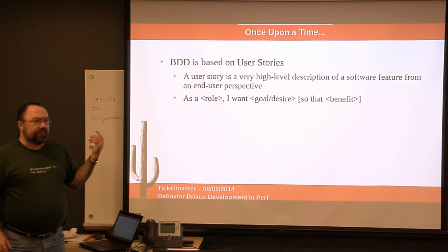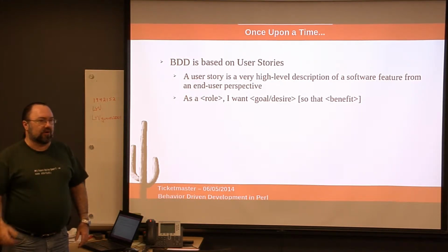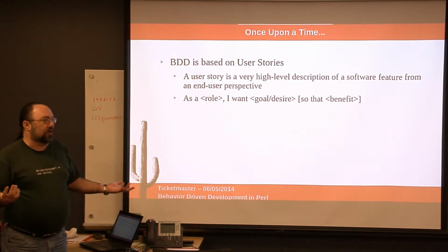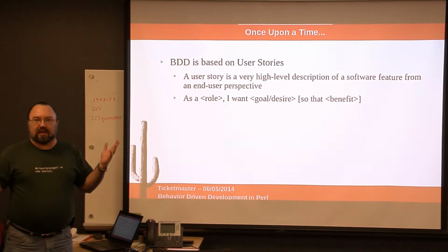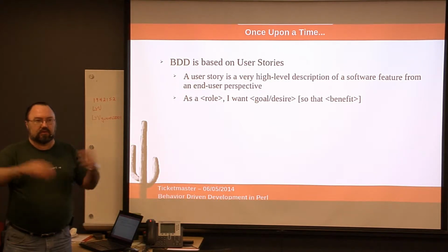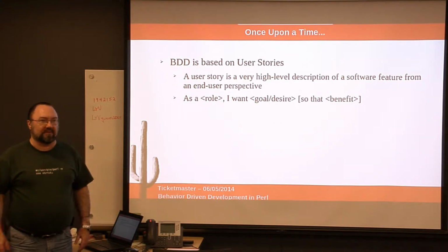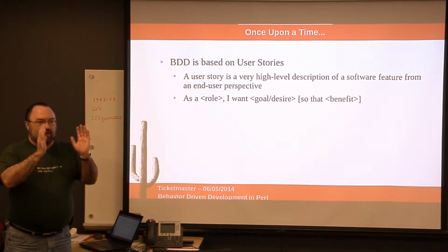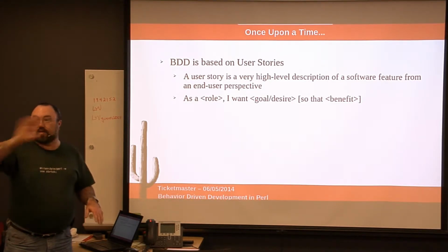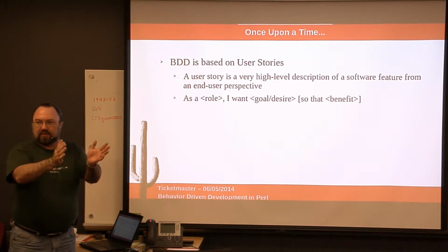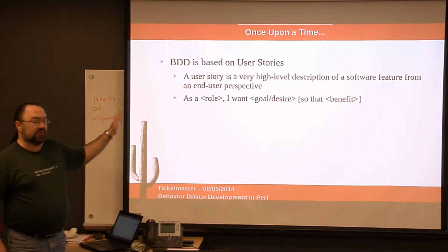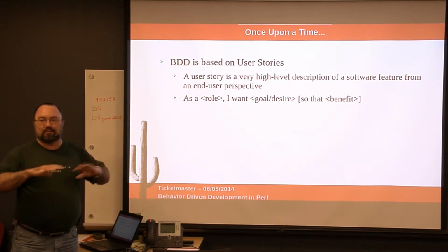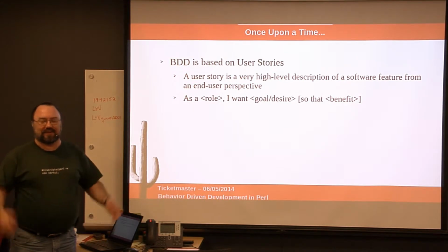So I also kind of think about it, other people may disagree with me, but for me, it's kind of a unit of work. If a user story is too big to fit in one sprint, then we say, hey, we've got to break this down. This is too big. So then you break it down into smaller and smaller pieces until you can finally say, yes, we maybe can't complete all of that, but we can complete this subset of it in a 2-week period. And that's what you go for. So that's what a user story is. There's a lot of terminology that gets slung around in this stuff. You have to kind of learn the lingo.